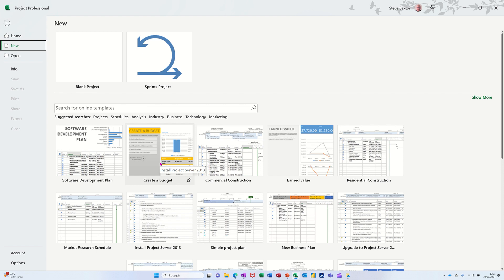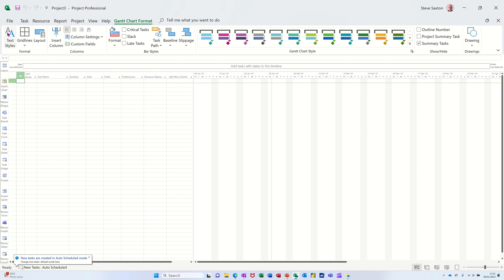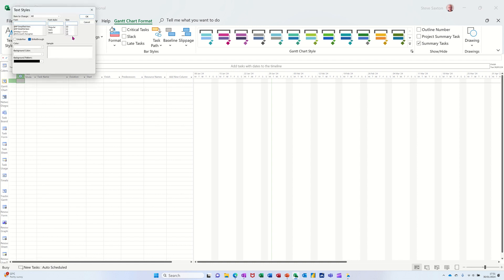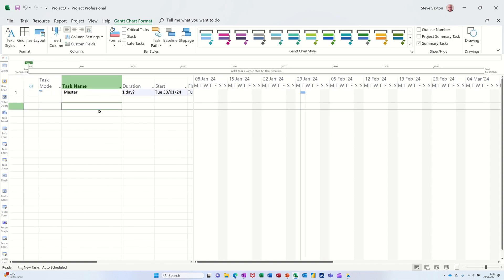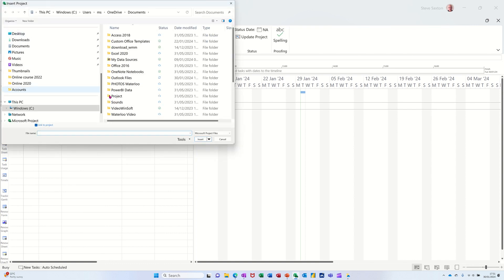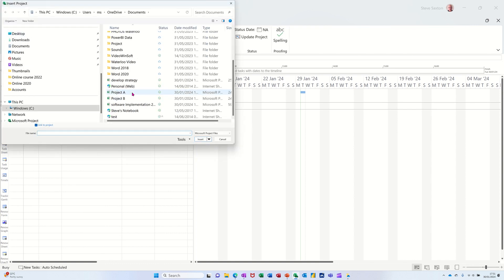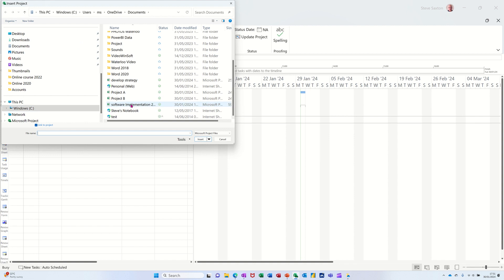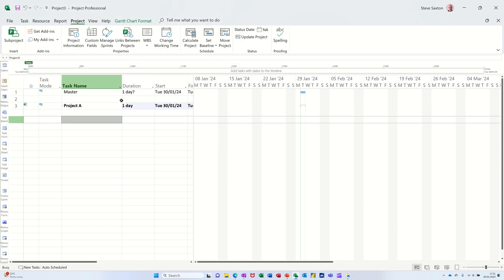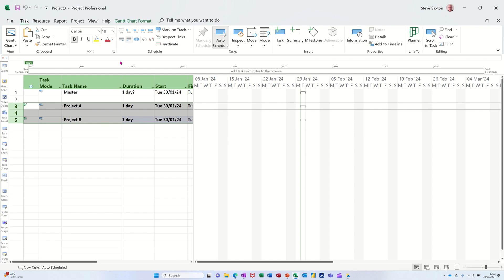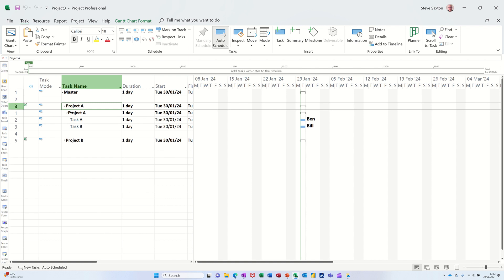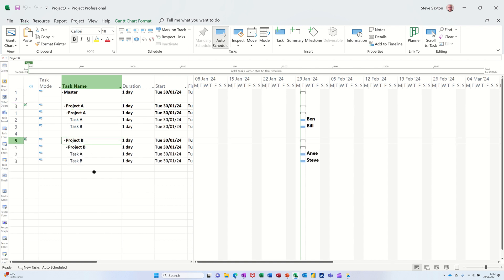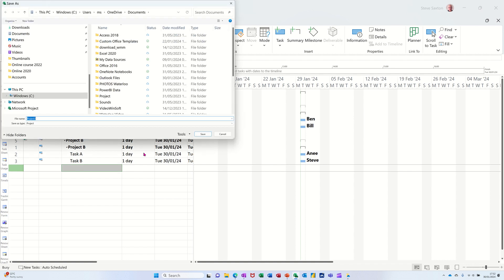So I've got my two files where I've got allocated resources, but now I want to create a master file where I'm going to bring those two together. Let's change the settings again. So I'll just call the title Master and then give myself a couple of line spaces. Go into the Project tab and I'm selecting sub project. I want Project A first, another line space, sub project, and then I want Project B. And then I want these indents underneath the summary, so it gives me an overarching timeline. Open that up and see the resources sitting there. So I'll save this as Master.